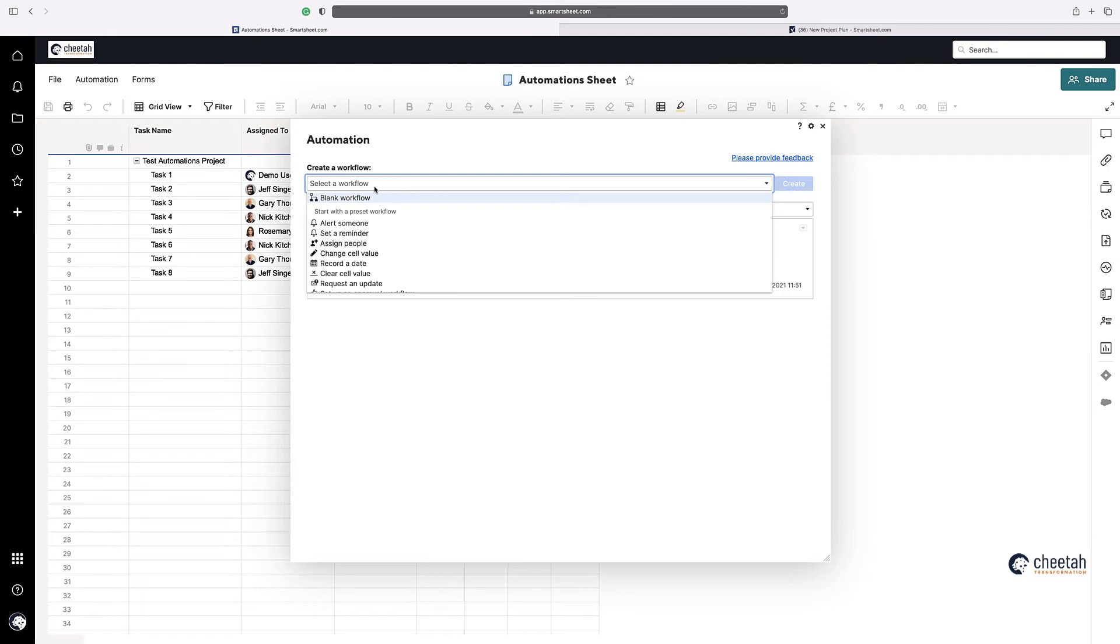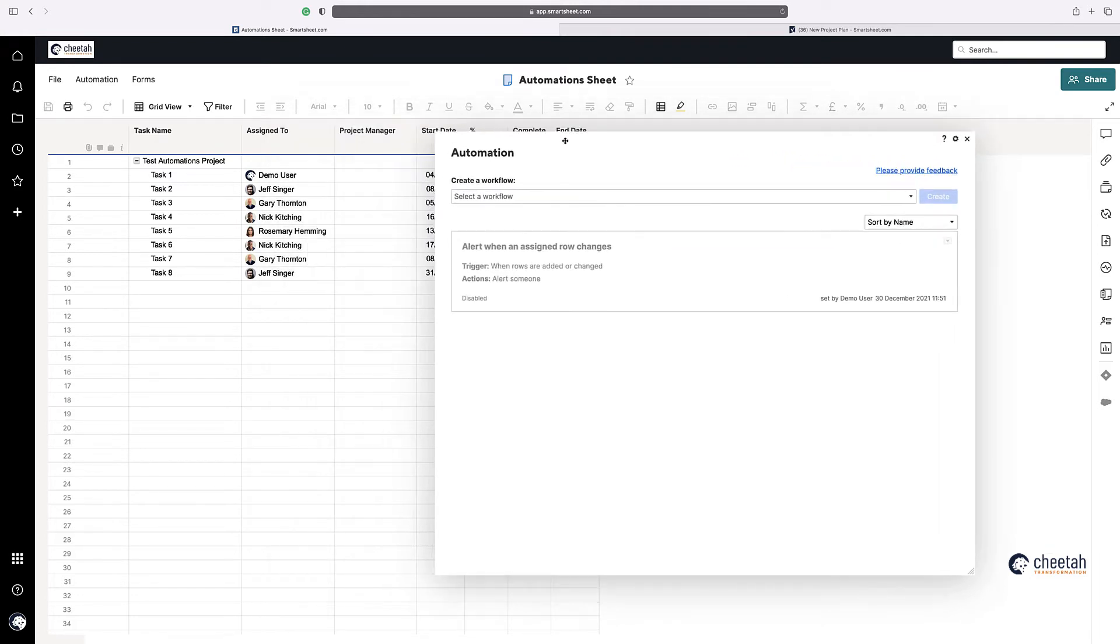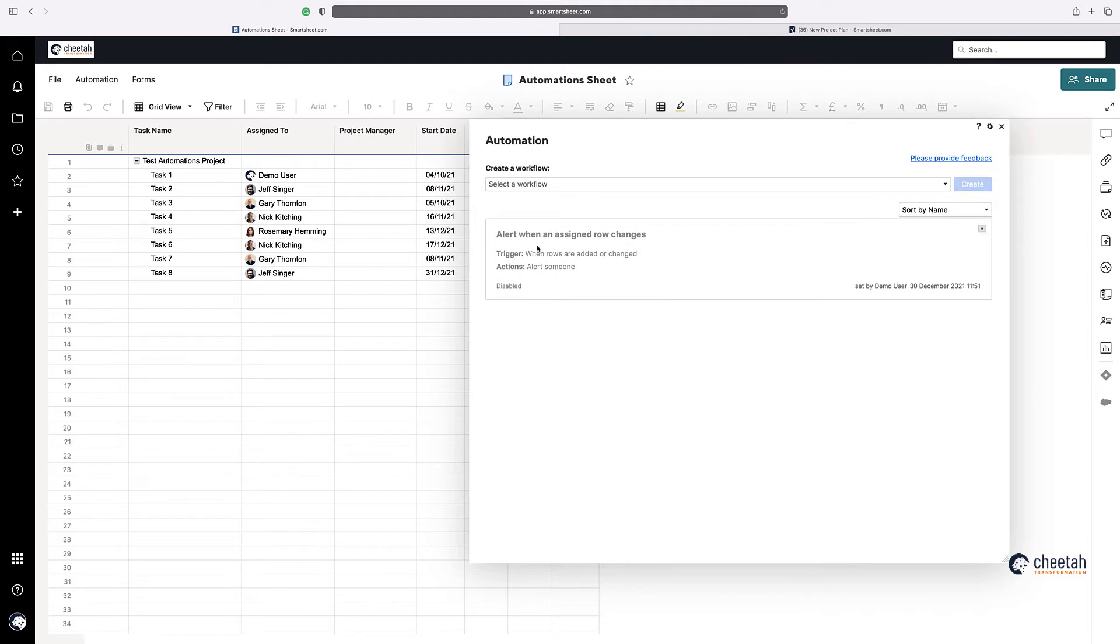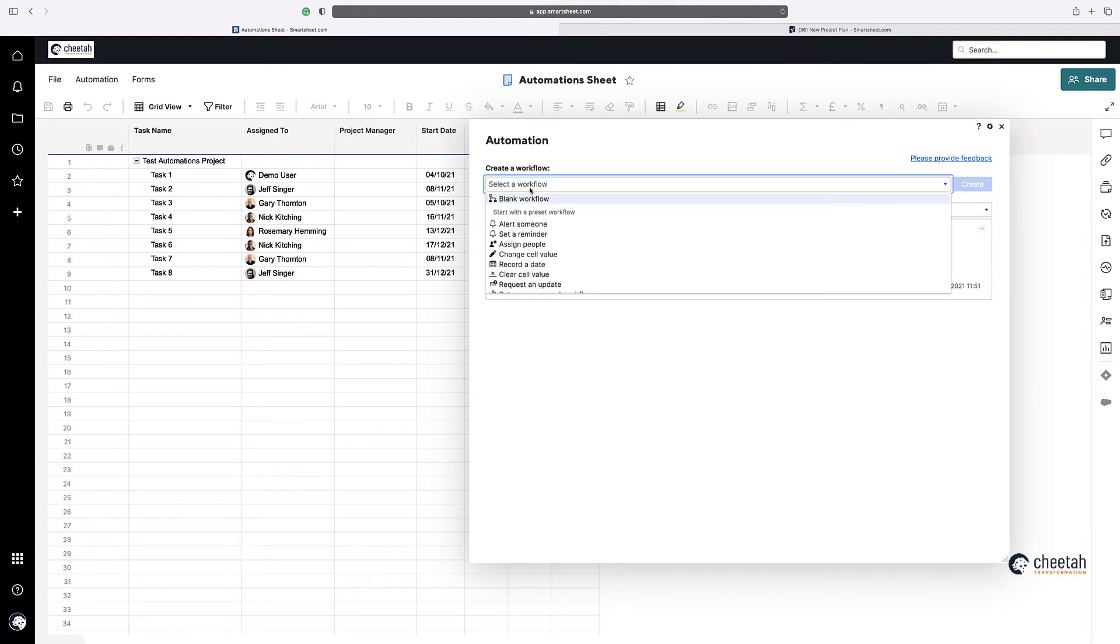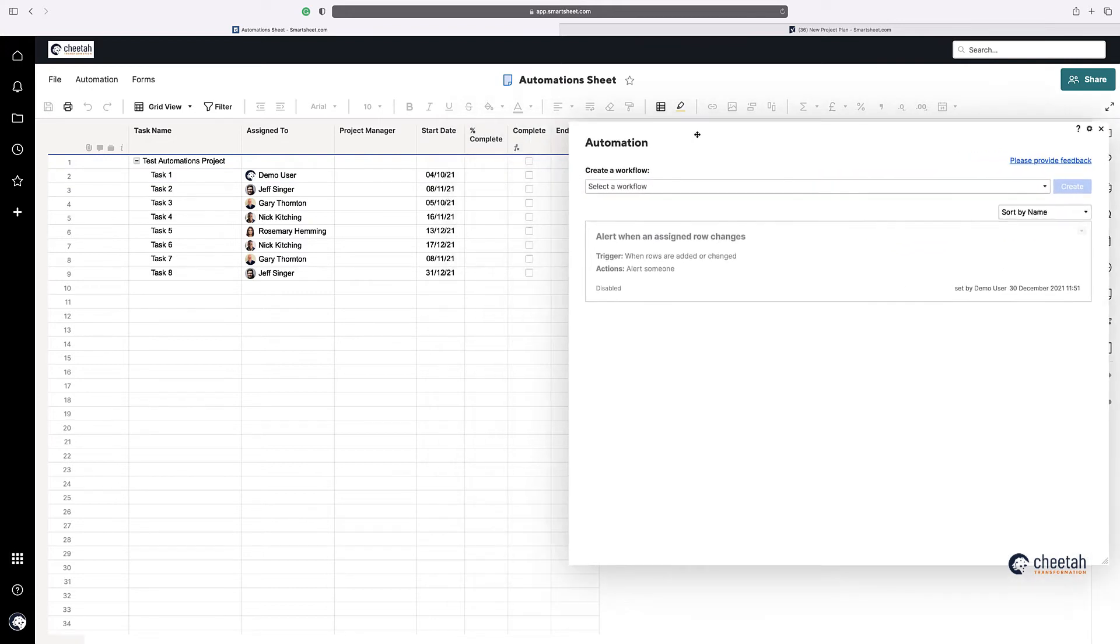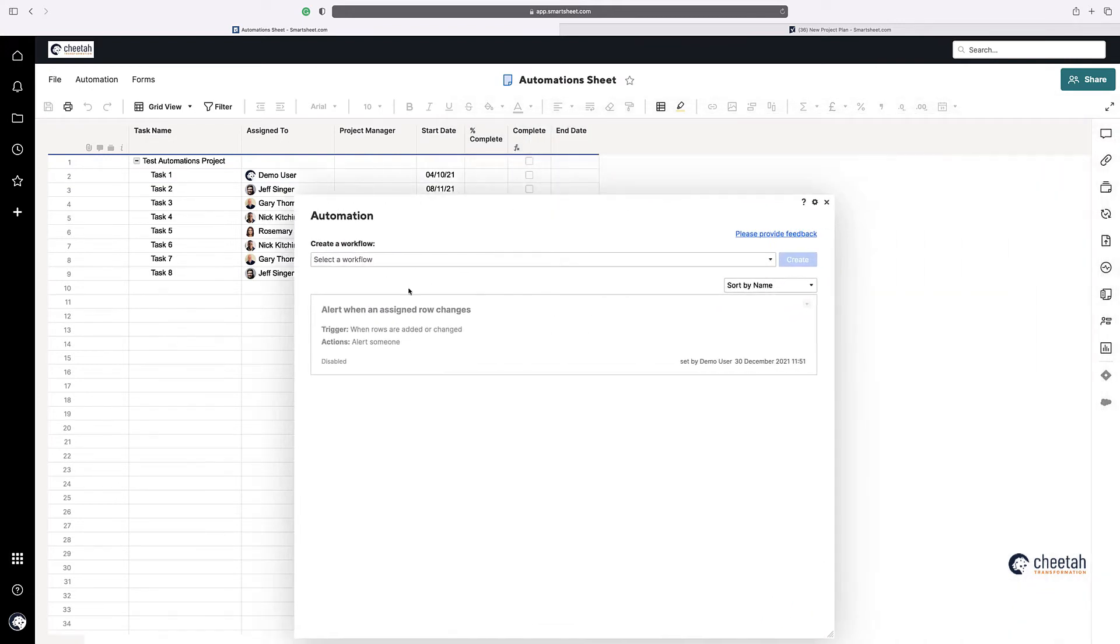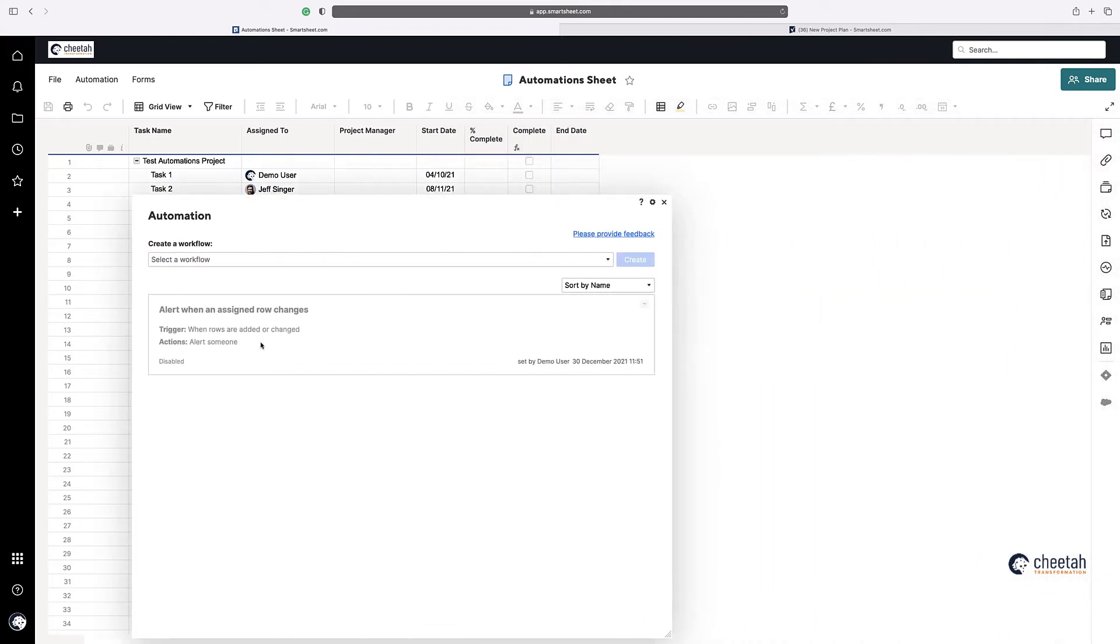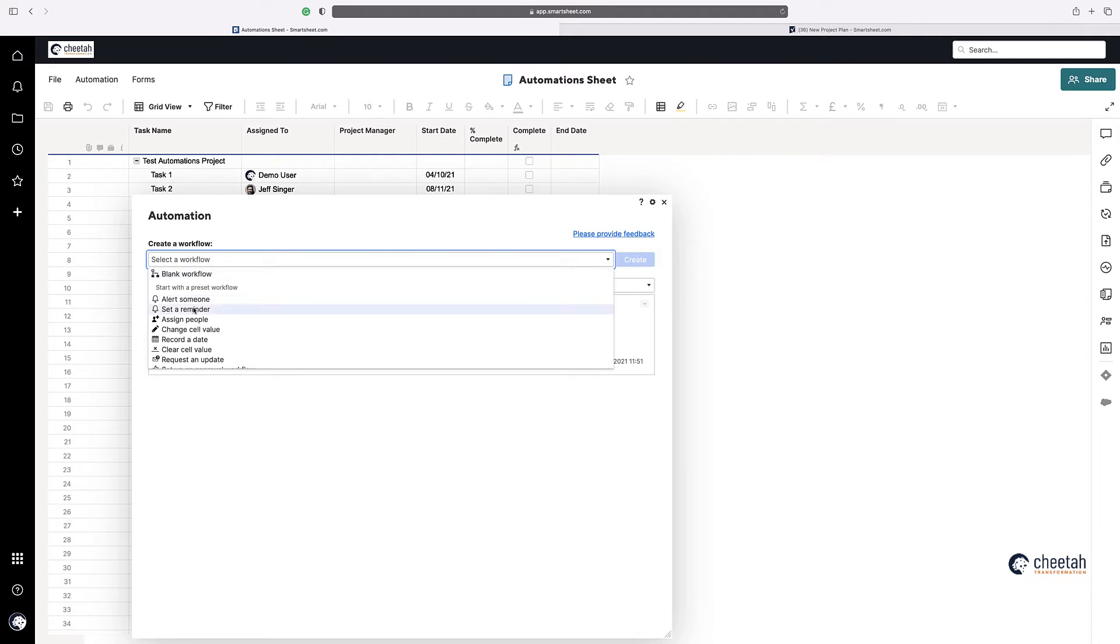And you can see now, if I just edit that, so when rows are added or changed, any field changes, run this daily, alert someone, send a contact in the cell to this assign to. And that will send me a notification saying that something's been assigned to me. So that's the sort of default notification that comes up. So normally when it comes up for me, I always say not right now, and then I can go back and enable that automation if I want to.